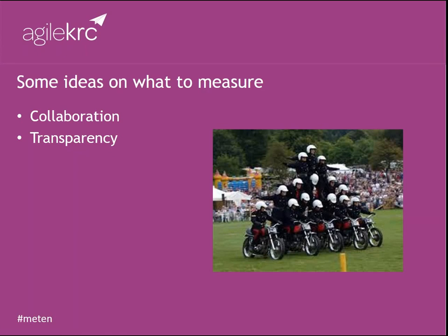I've heard the term emotional seismograph used before. Someone who's very well known in the UK, Rachel Davis, I don't know whether it's her term or she borrowed it from someone, but it's certainly a nice term to almost put a great big seismograph chart on to show how happy people are, the transparency, the collaboration, all built into that, so that you can get a feel for how the project's going. And they're normally really quite funny to look at. Everything goes up and then there's a release and it comes crashing down and builds up and goes down. But again, everybody's got to buy into that sort of way of working.